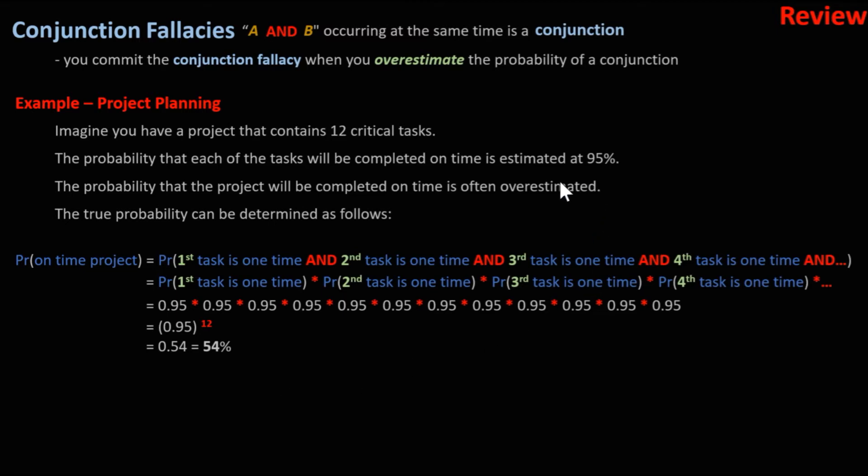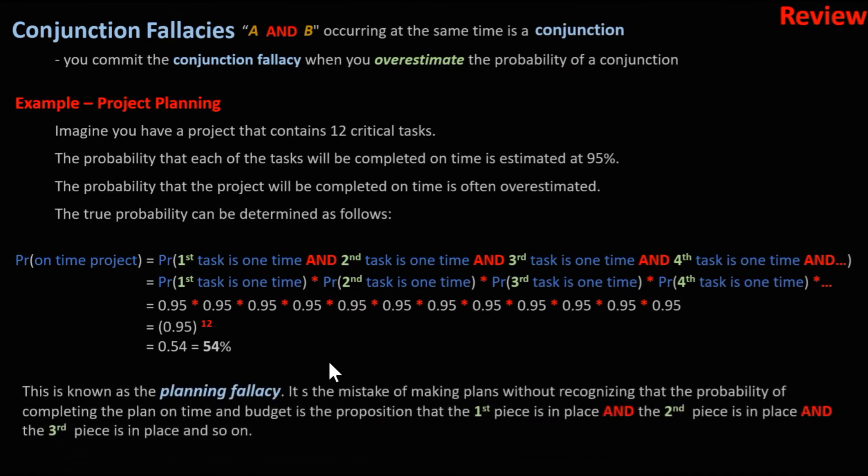Lots of people will look at the probability of any one coming in on time is 95%, so they assume that the project will be on time 95%. That's the conjunction fallacy. In fact, this happens so often in planning they call it the planning fallacy. It's the mistake of overestimating the probability the plan will come in on time.